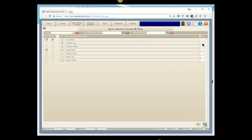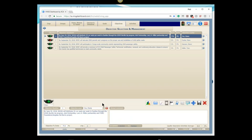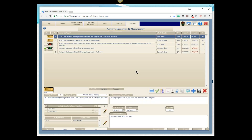Now that we're selecting an activity team, the other option we have is to assign an FTE or full-time equivalent value. Up front, what we're typically doing is estimating the amount of time this person is going to spend on this particular activity. In this case, we have both Diane and Mara estimating a 0.1 FTE, or about four hours a week each. We use that to do analysis on the resource cost. Human resources are the biggest cost factor in any project, so at the objective level it says we have about a 0.6 FTE — allowing cost-benefit analysis at any level in the pyramid.